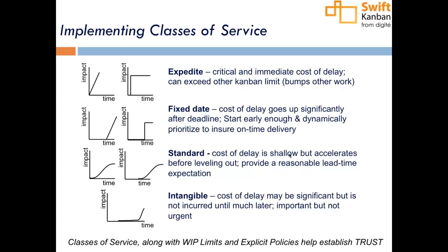One of the most useful discussions that happens when you define class of service and are looking at new work coming in is that you are able to have the conversation that, hey, if you want me to take something which is urgent, then you need to be prepared to take off something that I'm already working on. And this becomes, go ahead, Ramesh.